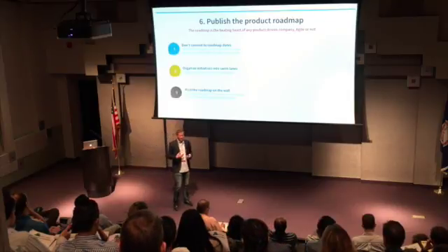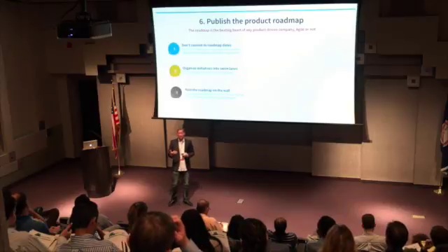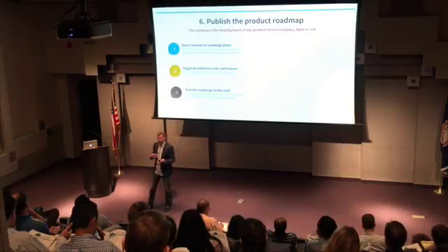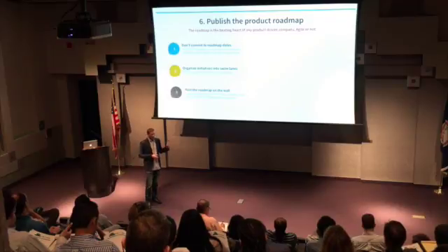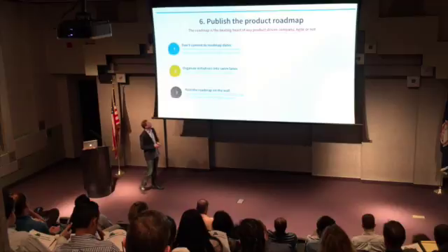It's not anti-agile unless you start making a ton of feature-date pair commitments. Then it becomes very anti-agile real quick, right? So you have to be able to budge on something, whether that's scope, timing, quality, whatever, right? But having some sort of expectation setting within the organization is really important, and a roadmap is a great way of providing that.